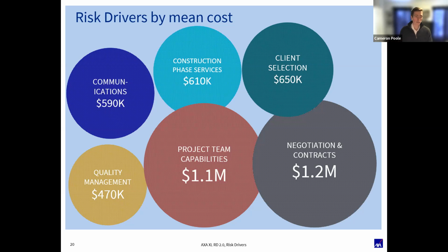Single family home, I kid you not, the insurance carriers end up renting nice single family homes on the Cape and the Vineyard every year pretty much, because an architect is designing a project down there. The family wants to move in June 1st for the summer. They don't get to because there's been delays on the project. And now there's the consequential damage of, hey, we were expecting to have a place to stay. We don't. And so now we have to find a place for them to stay of like quality. It's a $5 or $10 million home. The rent's going to be pretty expensive for a few months of that. So in your contracts, that's another key thing to have, is a waiver of consequential damages.